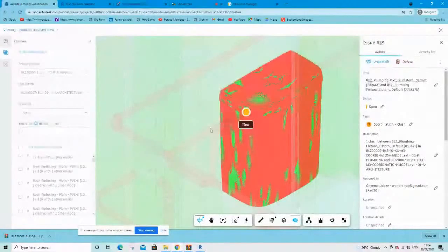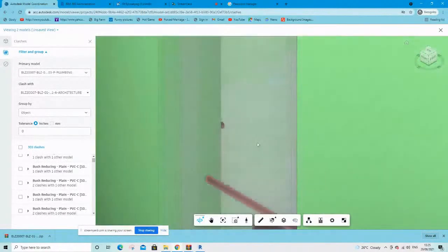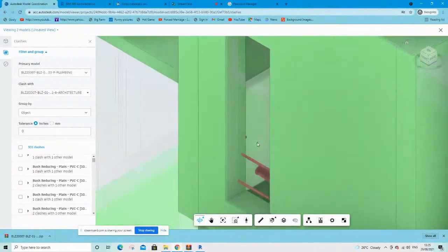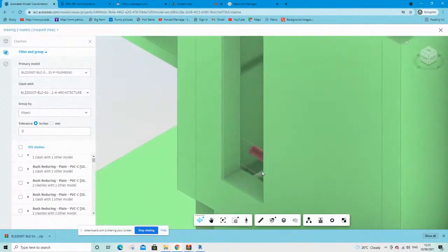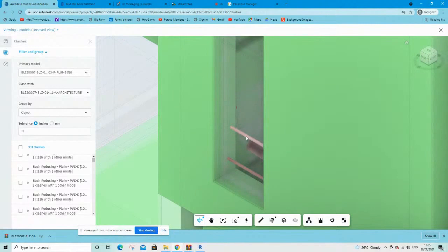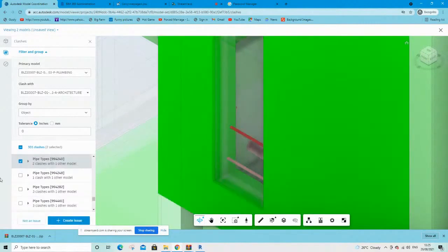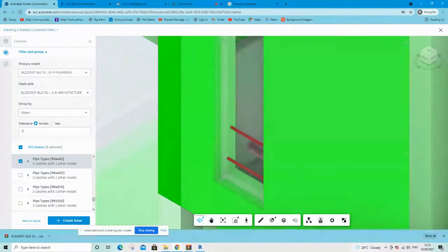So you can see now that when you have clashes on projects, this is a good way to begin to identify those clashes and begin to assign them to people to resolve. So whoever modeled this now will go back to Revit. For example, you can see this pipe that is passing through a window on this project, right? If I click on this, it will even show me where it is in this place, right? If I click on this one as well, it will also show me where it is. So something like this is an issue. This pipe shouldn't be passing through a glass window. It should pass through a wall, or the route should change or something.